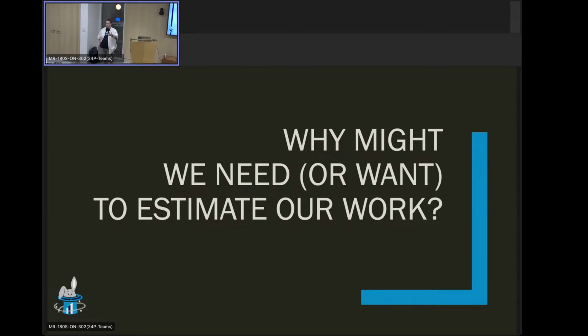And the team kind of said, oh, okay, we get it. We know what the problem is. We understand what it is. And I asked them, have you done this before? They said, no. I said, okay, well then, I'd just like to get a ballpark. Do you think we could probably get this done in about a month? They laughed. They said, no, we can't do this in a month. I said, cool. What about 12 months? And they said, yeah, obviously we could do this if we had a year. I said, cool. What about 6 months? Yeah, maybe, probably. I think we could probably do it in 6 months.